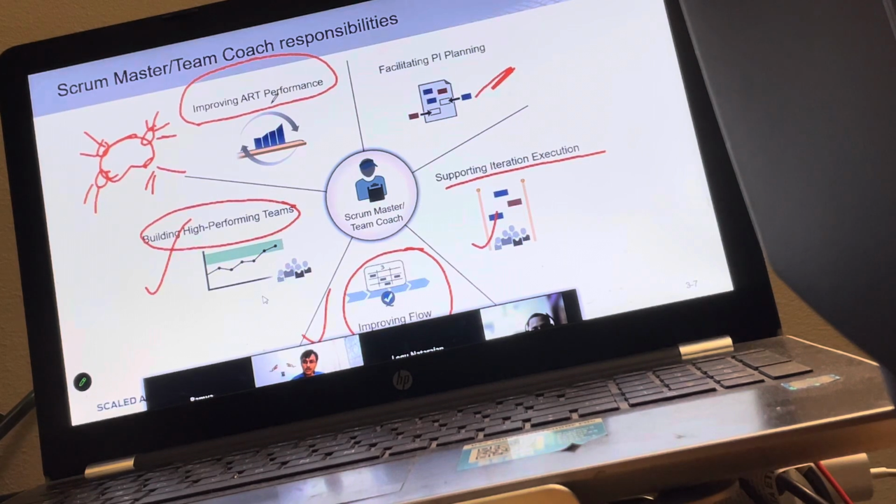Thanks to the question we discussed yesterday, we can say, yeah, there is a big meeting happening. Now, before you go for a meeting, you should know what is your velocity, what is your estimated velocity, how much work we have done last time. Based on that, what amount of work we can even plan. So the Scrum Master should ensure that we have a clear idea of our capacity/velocity, and should help the teams know, with the help of retrospective, what kind of planning mistakes we did last time so that we don't do it again.